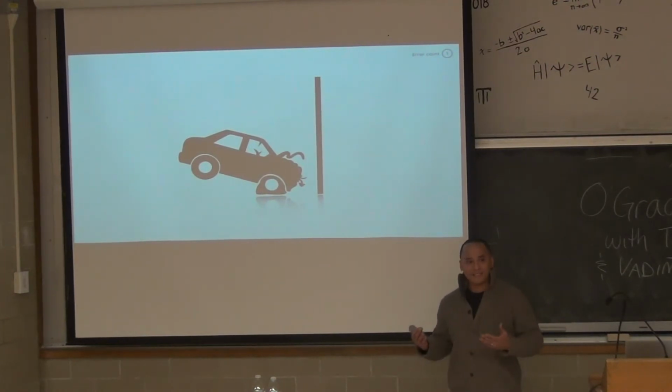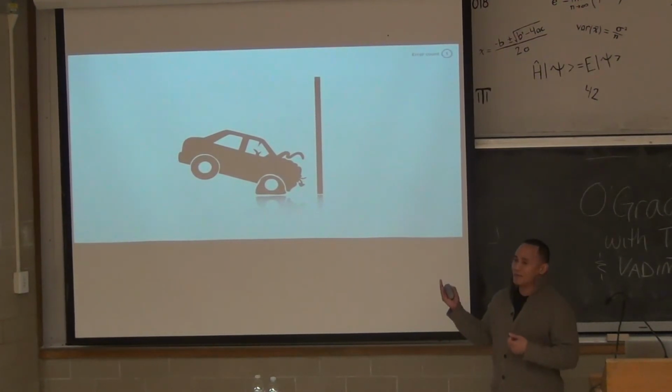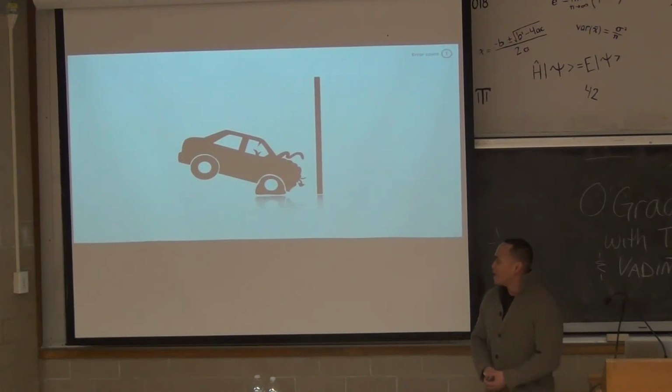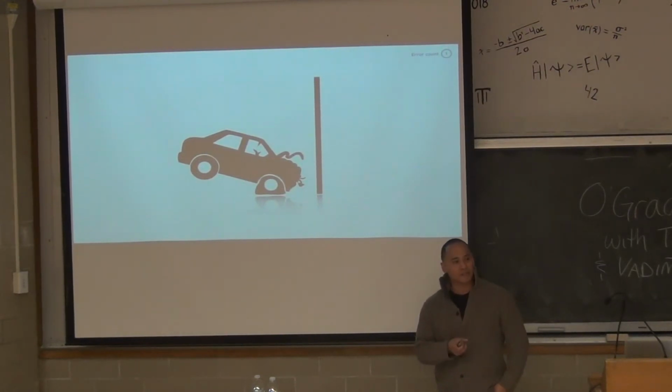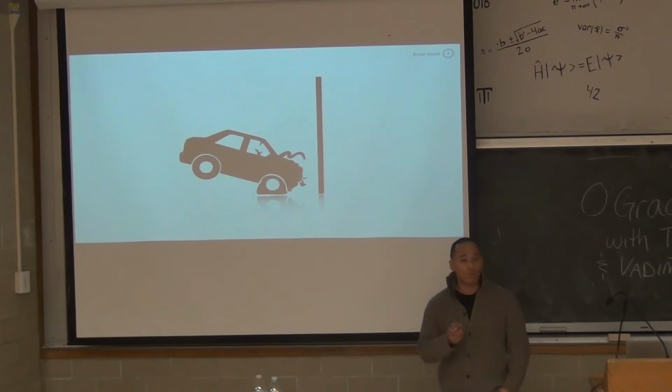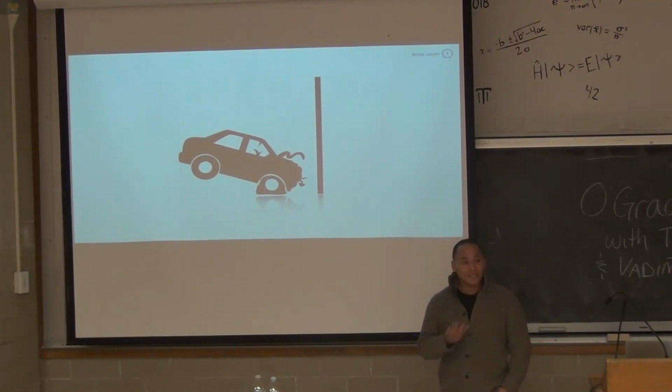And it went really well, and SLT's like, yeah, let's do it. And then we hit our roadblock. What our roadblock was, we presented to our real product owner. For those who don't know what a product owner is, it's an agile term. Product owner is the person who says yes or no. They make the decision. And going into this meeting with the product owner, not once had we had one meeting with this guy. We didn't have one conversation with him. We didn't know who he was till this meeting. And it was a disaster.